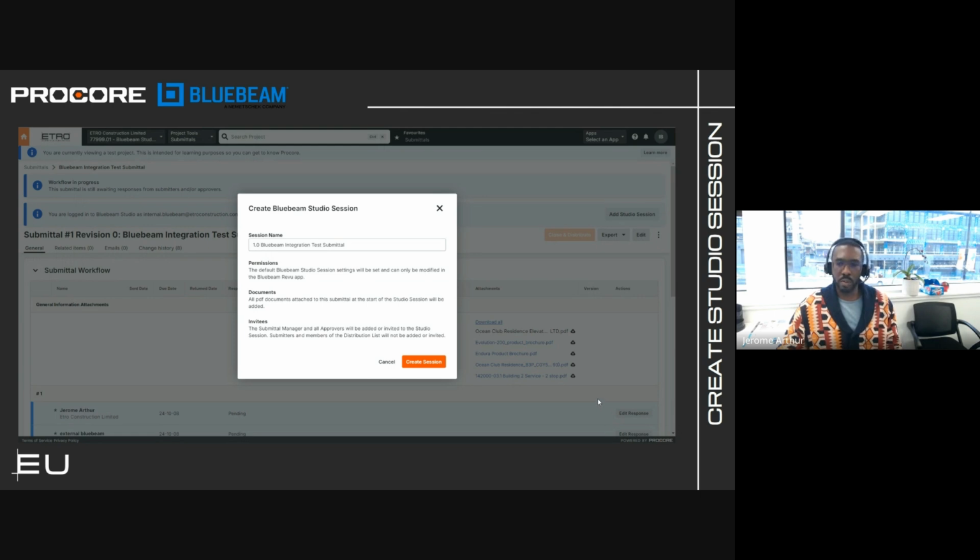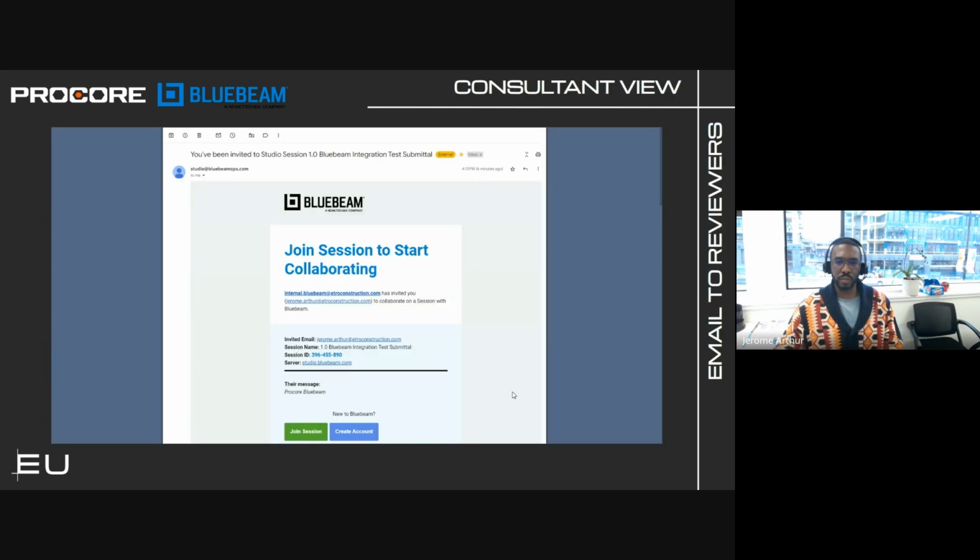The tips here would be to use some identifiers for your project name, as well as the submittal itself. It will automatically pull that session name from the submittal number, but just make sure that is project specific, because your Bluebeam session is going to have that, as well as the emails that go out will just have this session name.